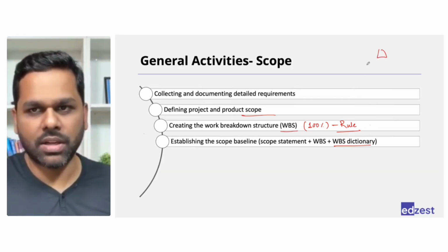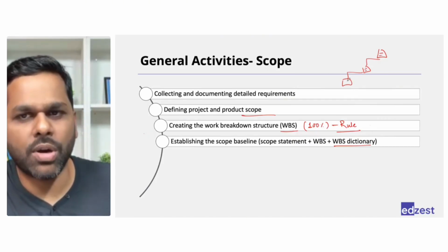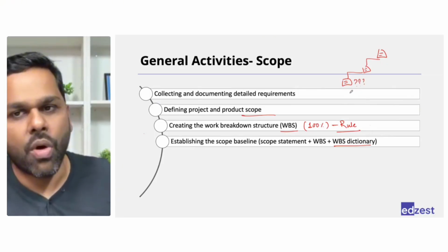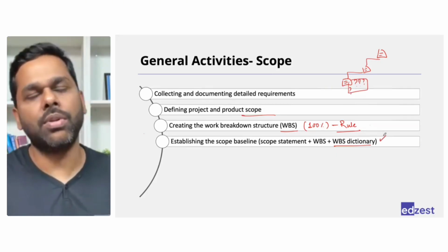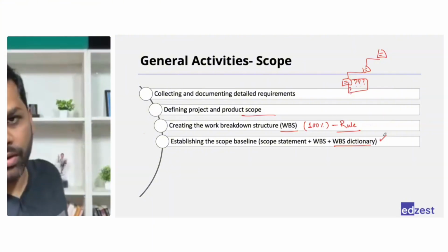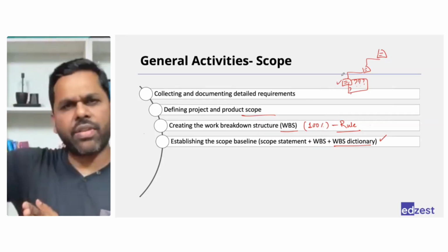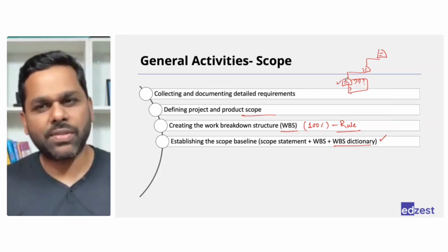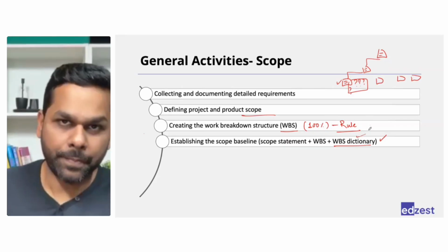So we discussed WBS is a structure. In this structure, you will be mentioning one or two words to talk about what that deliverable is. When will that be delivered? Who is responsible for it? How much budget? What activities need to be carried out? All those things should be added into something called the WBS dictionary. Let's say we have built that structure on the wall. Pick up one item from that, and write on a page every single thing about that particular deliverable. Add multiple pages for multiple work package items, and you will get something called the WBS dictionary.